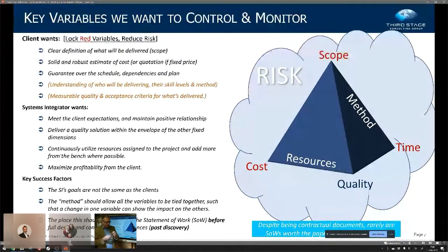And then finally, of course, get all this sorted out before they start work. So don't skimp on doing the SOW. It's absolutely fine to start a project, to mobilize it with a letter of intent, but don't let actual code start being cut until you've got a statement of work that you understand, that you think gives you that good control, and that you think is going to hold the systems integrator to account if they start making a mess of things.